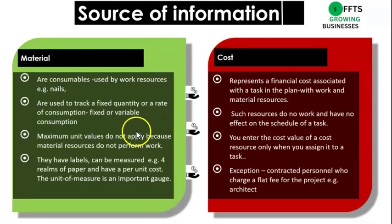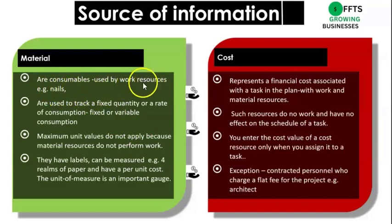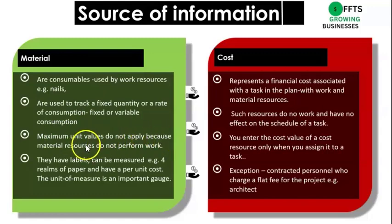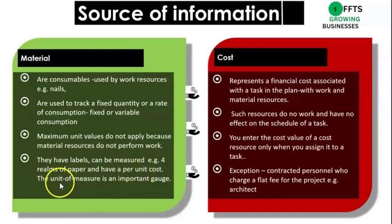Material resources are consumables — nails, lumber, galvanized. They are used by work resources and are used to track a fixed quantity or rate of consumption. Maximum units do not apply because material resources do not perform work. But they have labels and can be measured. If you have paper, you have to say how is it named and give a unit cost. The unit cost is an important measure because if four reams are consumed, it will be four times the unit cost of one ream.